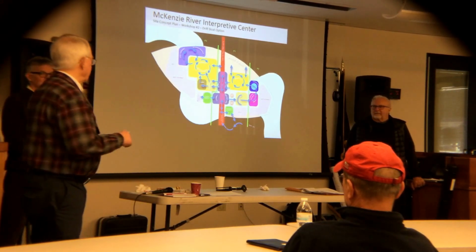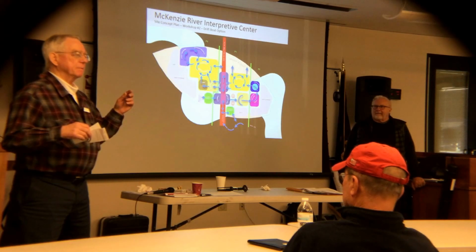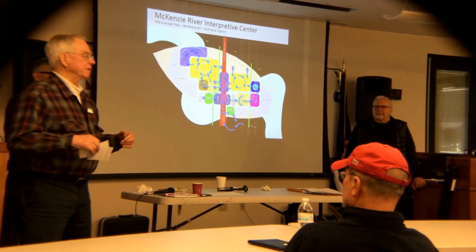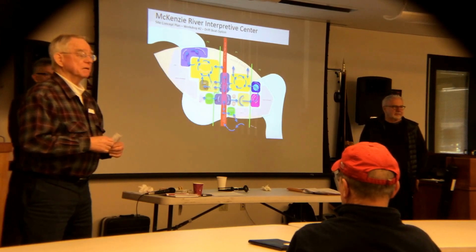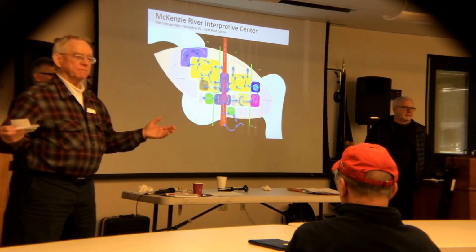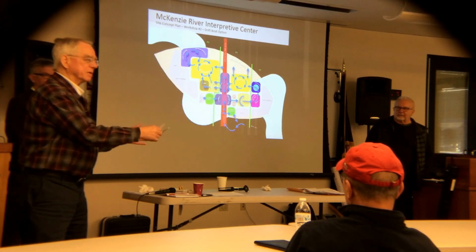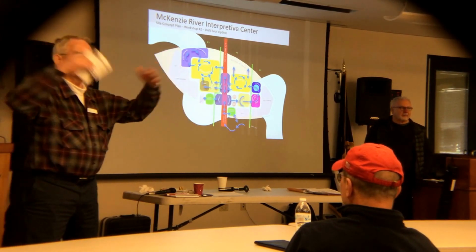There's one other component here that we haven't mentioned. That is, when the University of Oregon study group gave us a hard number, kind of an estimate, that all of these interpretive centers are able to support their operating cost only to the tune of about 25% with gate receipts. So my personal belief is I don't want to build anything unless we have an endowment to support the shortfall of the operating. In other words, don't build it and hope somebody's going to pay for it. Establish an endowment with the Oregon Community Foundation. I don't know whether that's $2 or $4 million, but have enough annual income from that to cover the shortfalls. That's all in the dream.